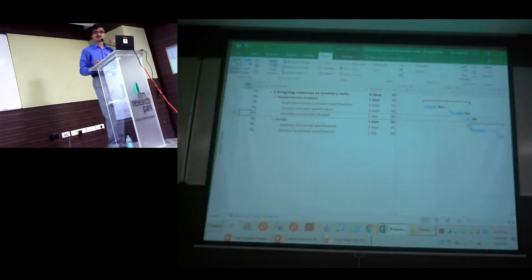Here is where I wanted to ask you. Suppose somebody is working 0.5 here and 0.5 there, spending 4 hours on the first task and 4 hours on the second task. In that case I don't want to resolve it. That is true. So don't worry about it. What I'm saying is, though it is 0.5 and 0.5, Project tracks at a minute level. So it will still assume 8 to 12 on the first task and 8 to 12 on the second task. So you will still get that alert. When you resolve that conflict, you will see the dates will not change because it is only the timing that is getting shifted.